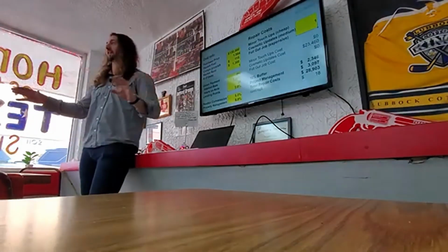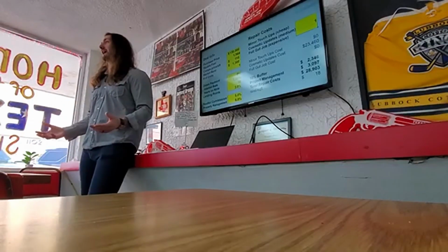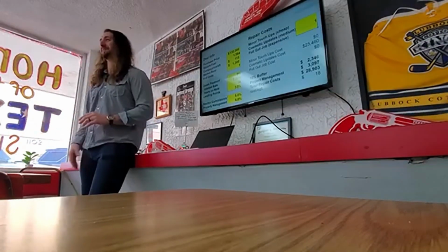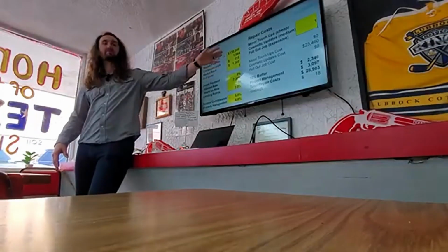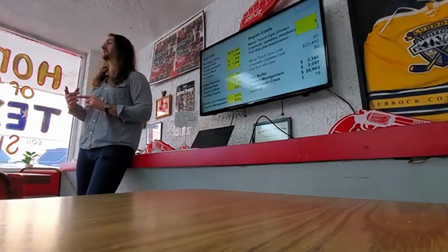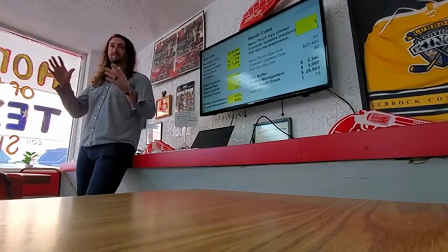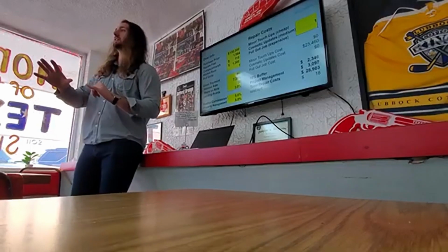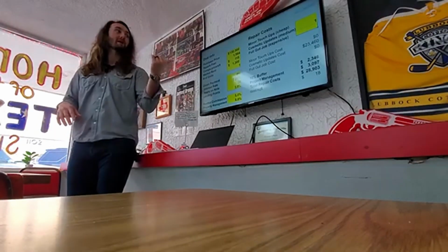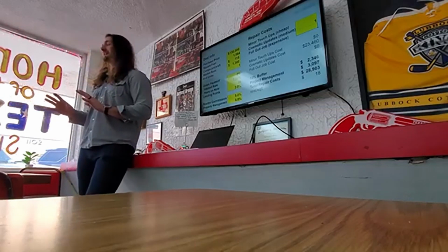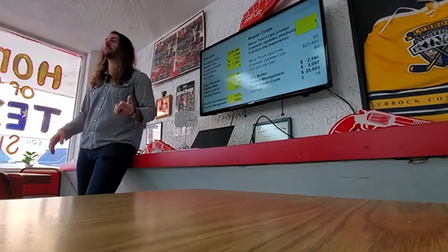And that's like everything, except for rebuilding a house. If I could build brand new houses for 45 a square foot, we'd be building as many as possible. So this one would probably be in cosmetics, maybe a little more, but we'll go with that. So as you're building your calculators, especially if you're just a wholesaler and you wanna get a rough number, if it's going to be a rental and just need barely any touch-ups, $5 a square foot. Cosmetic flip, $15 a square foot. And gut job, you're going to need some estimates, but we put 45 just for a super quick analysis.